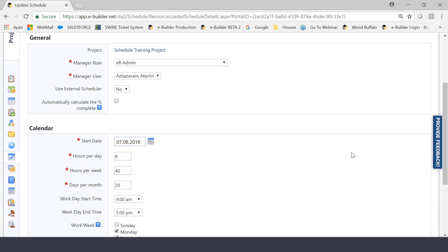Now, a big note that I have to say here, if let's say you decide to use external scheduling, which is something we spoke about earlier in the general section, please be aware that these parameters may be different than the parameters that are on the software that you're using. In other words, if you'll say you're importing Microsoft project, please make sure that the parameters here are in line with that of the other software, because if they are not, then you're going to get conflicting information when you import something from one system to another. Okay. So just be aware of that for now and understand the importance of these parameters. I'm going to leave them as is.